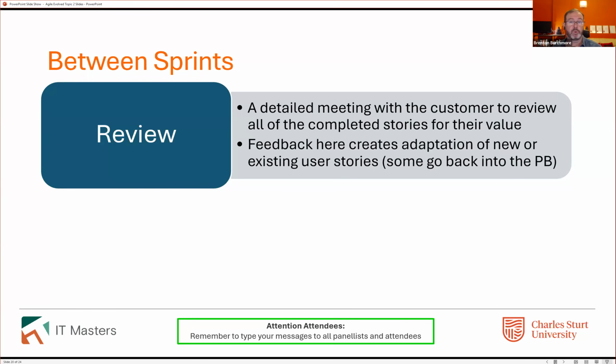So you have to make it worth their while. And they have to commit to this. They can't say, oh, look, can we put that off till next Tuesday? No. We cannot simply say, let's just extend our sprint by another 4 days because the customer's playing golf. Can't happen. Lock it in up front. You're going to work with us on an agile basis. You or your representatives are going to be available every fortnight, every 3 weeks. It's another reason why the sprint is patterned.